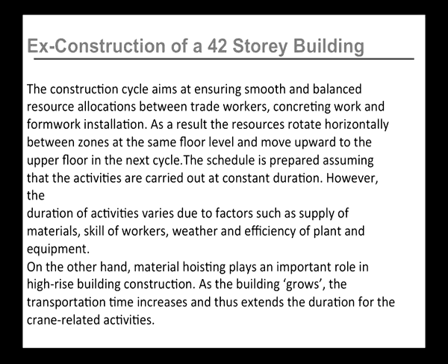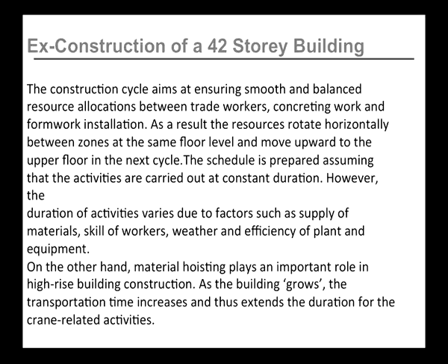Not only that, but if there is no plan, do, check, act mechanism at the working level, it also adds to a lot of rework of construction activities, that also builds up a lot of time taken to perform an activity that in turn affects the entire construction cycle in totality for a particular floor and also the construction of a high-rise building. Material hoisting also plays an important role in high-rise building construction. As the building grows vertically, the transportation time increases and thus extends the duration of crane related activities also.